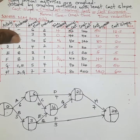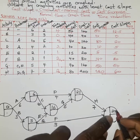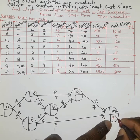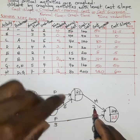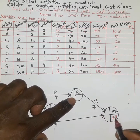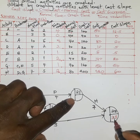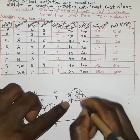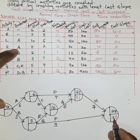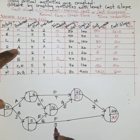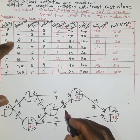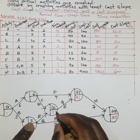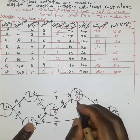We now perform the backward pass, working backwards. The ending time should match the latest finishing time. The backward pass involves subtracting the duration from each node going back. For example, 28 minus 7 gives 21; 28 minus 3 gives 25; and 21 minus 5 gives 16.